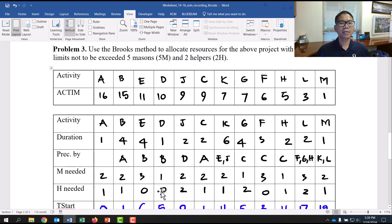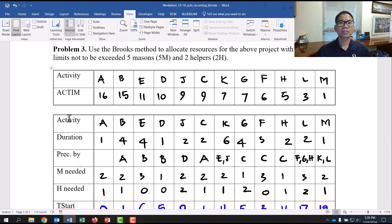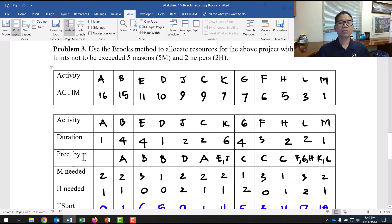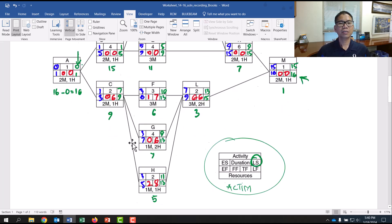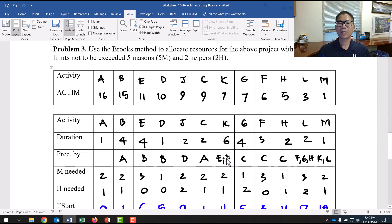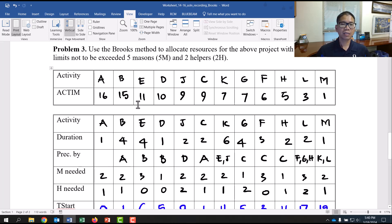Copy the same activity order to the next row. Then enter duration: Activity A has one day, B has four days, etc. Row 4 is the predecessor row — Activity A has no predecessor, Activity B has A as predecessor, C has A as predecessor. Some activities have two predecessors. This preceded-by information is based on the CPM network.